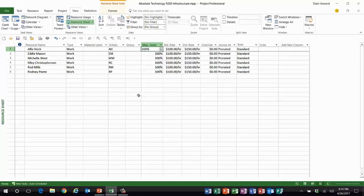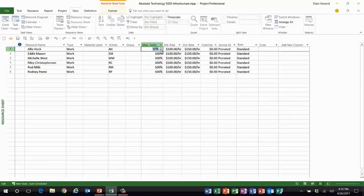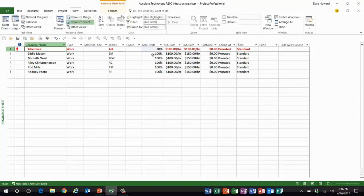Allie Heck is being pulled off my project half-time to go work on another higher priority project. So now I only get Allie Heck half-time. So I'm going to change her max units value to 50%. And now look.